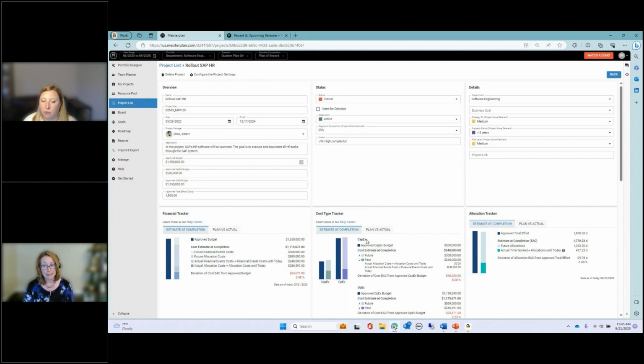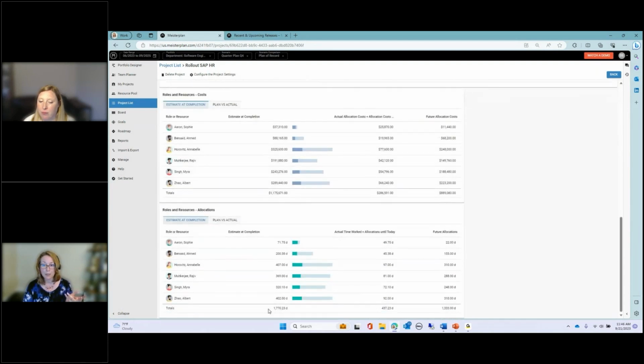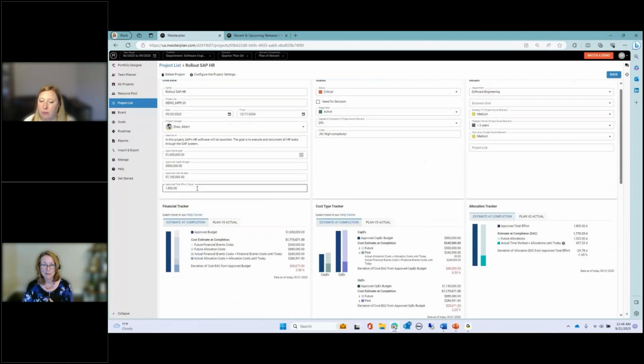The other thing I see often is that I don't really have dollars I'm trying to manage, it's a lot of people's time. While this might not be classified as a budget necessarily, I have encouraged customers to use this as a way to baseline the project's time early on, after you have done your initial refinement and figured out, boy, it really looks like it's going to be 1,800 days. How do you know that? You would know that by looking at the resource and cost allocations. They get rolled up for you. You probably have a risk register that indicates some risk that could still happen, so you could increase that by your risk. That gives you then allocation tracker to monitor the time, what I'll call time budget.